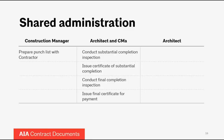The CM is the first person to work with the contractor or contractors to prepare the punch list. Inspections with respect to substantial completion and final completion are jointly done with the architect and the CM as advisor.